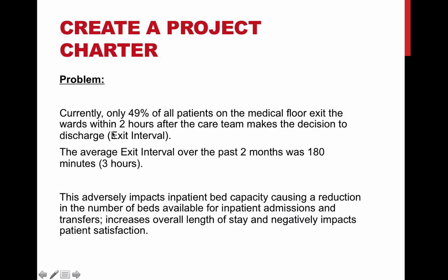So what the team does is, now they create what is known as a project charter. A project charter, we've seen this before. A project charter is like one or two pages where you outline everything about your project. So you write your problem statement. What are you really working on? You write your aim statement. What are you trying to achieve? You will write the names of your team members. You will write your project scope. You will write your business case, in short, about why this project is important.